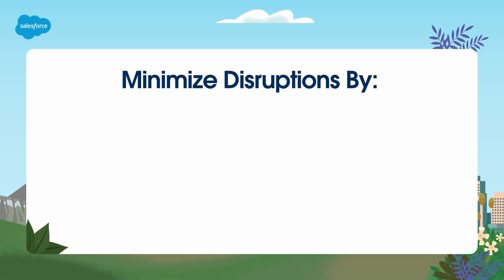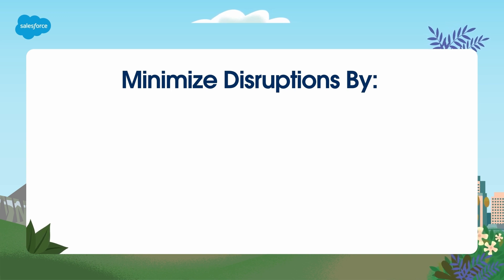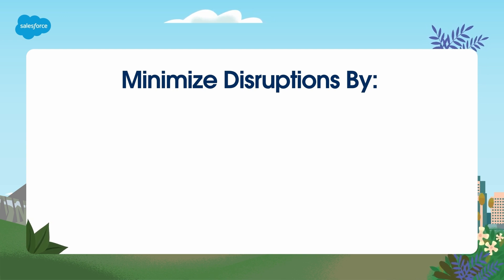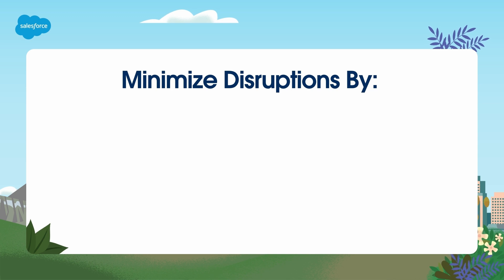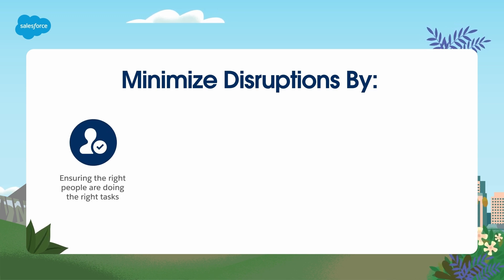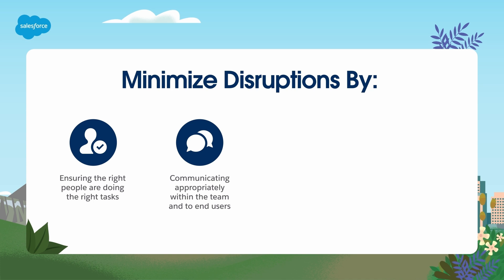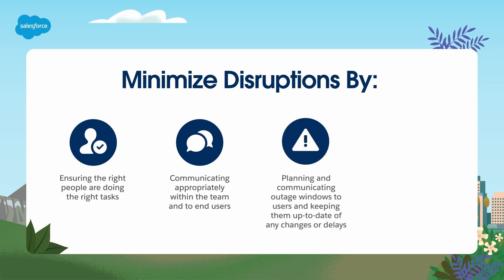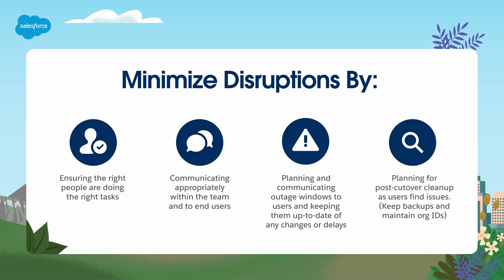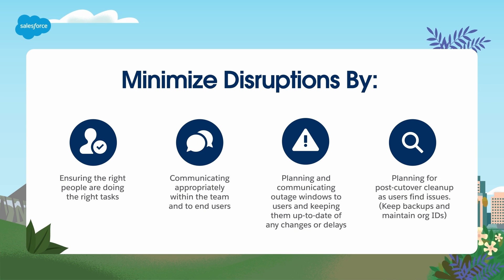When it comes to org migrations, let's acknowledge upfront that something may get overlooked and it may not be discovered until days later. Every member of your team will not be aware of every nuance in the configurations — after all, it took years to build. The risk of user disruption increases with the number of people making changes to the configuration and importing data, and the amount of customization in both orgs. You can minimize disruption by ensuring the right people with the necessary experience are doing the right tasks, communicating appropriately within the team as well as to the end users. Plan and communicate outage windows to users and keep them up to date regarding any changes or delays, and plan for post-cutover cleanup as users find issues. Remember to keep backups and maintain org IDs.